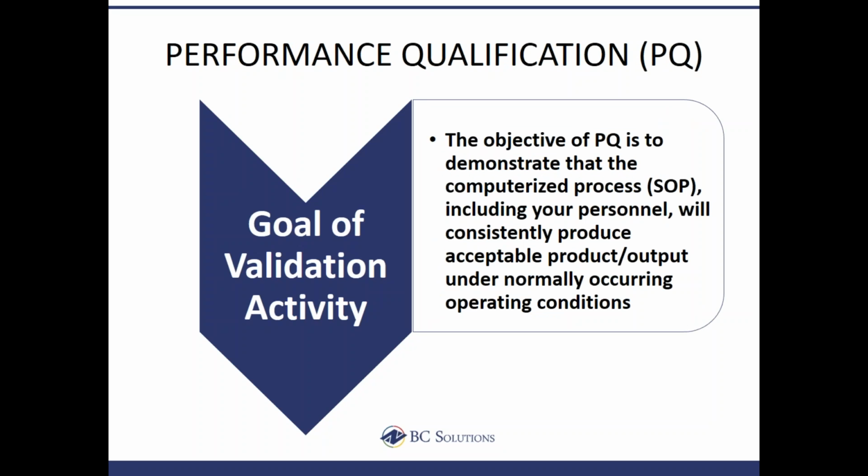The last kind of validation activity is PQ. The objective of PQ is to demonstrate that the computerized process, or what we know as the SOP, including your personnel, will consistently produce acceptable products or outputs under normally occurring operating conditions.